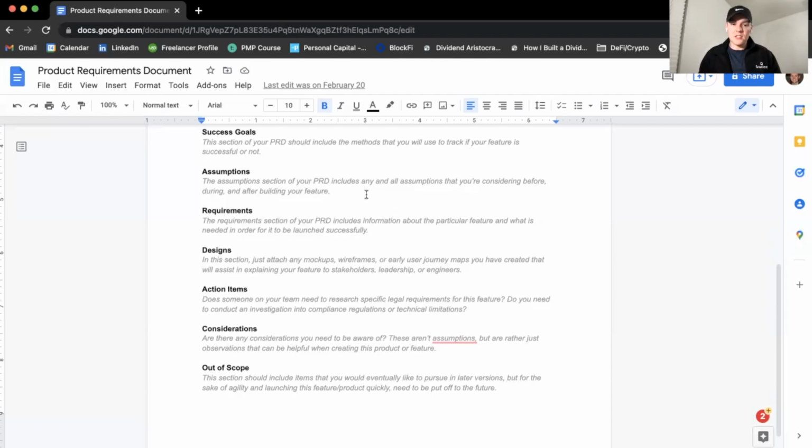And then as you're working towards that, you also want to add at the end of that the link, typically, to that individual user story in something like Jira or whatever your product management software is. And then you also want to include an area for any notes that you or your colleagues may add that provide further context and information, if there are any outstanding items, or if you have any comments that need to be made to the individuals who are working on those tickets.